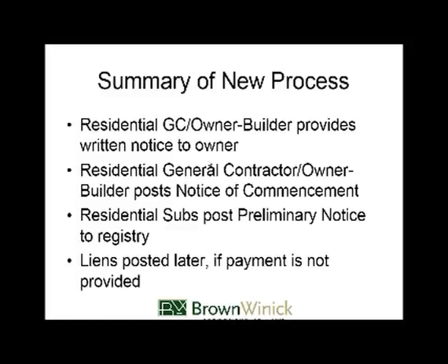There's a question on here. It says, when filing the verified statement of account, do you, as a practice pointer, upload both the old bar form and a bill of particulars or invoices? Yes, that is my practice pointer. That's exactly what I do. So what I post to the registry will look identical to what used to be filed in the district courts. I have the statement of account that they sign. Attached to that, I usually have an Exhibit A and an itemization of getting from $0 up to whatever they're claiming. And depending on how big it is, I have them attach invoices if it's small.